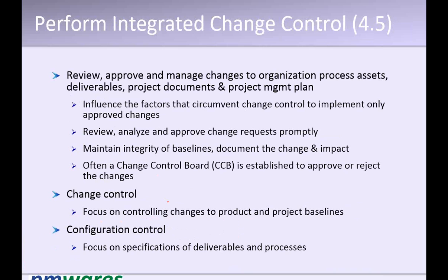Okay, so let's go to the integrated change control. What is the purpose of integrated change control? It is to prevent any kind of scope creep. What is scope creep? Scope creep is something coming into the scope which was not originally defined, without any impact analysis. So a new requirement or new thing has come into the project without its impact being analyzed, or time and cost being adjusted accordingly. This is called scope creep.